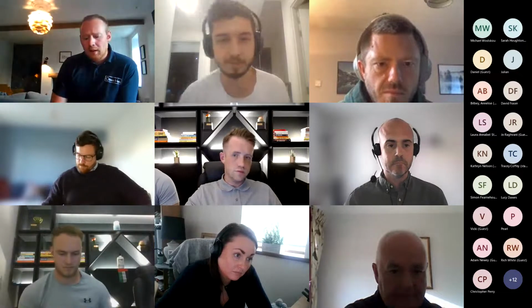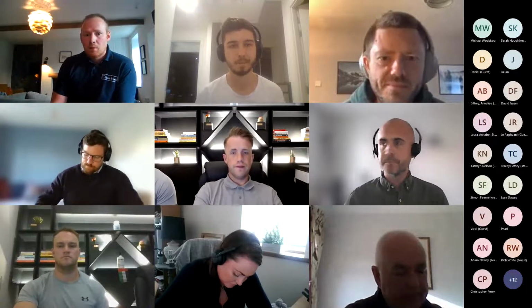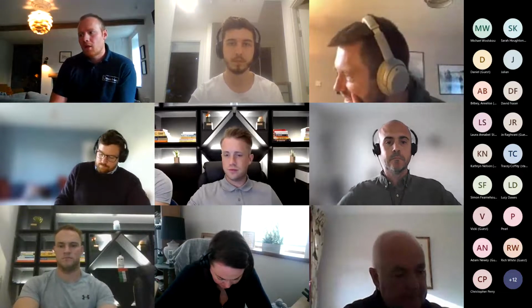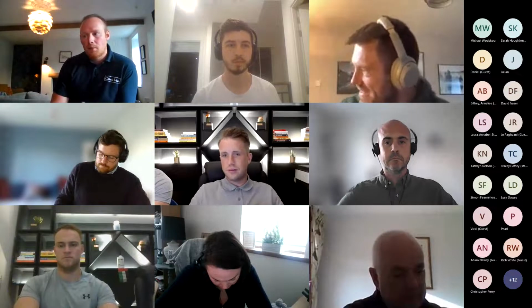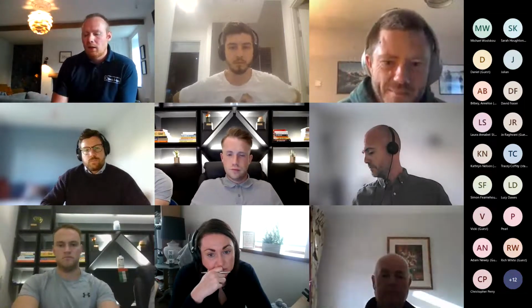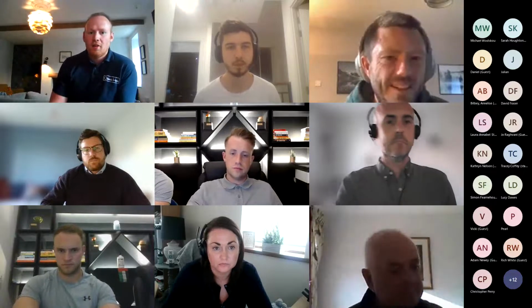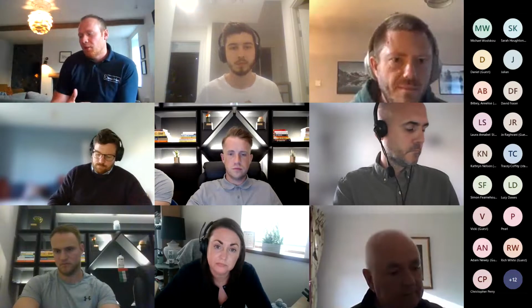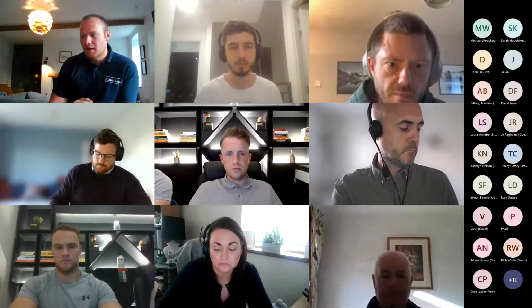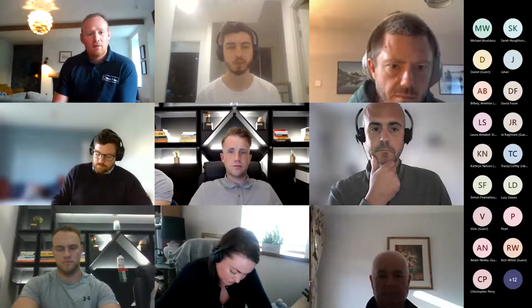Yeah, so basically if people are keen, we'll take a deposit. Our payment structure is basically we take a third up front as a deposit, and then once we start the build, we take another third, and then once we deliver, it's the final amount. So it's totally up to the client, really. I mean, like Calum said before, sometimes planning can take some time. So people have to put their name down and order the hut just to get the process moving. One thing I would say to people is, with a shepherd's hut, if it all didn't work out, you could just sell the hut. I mean, they're not going down in value. So I've sold a couple to some people, and it's given them that advice that it's not the be all and end all. You buy this hut and you can't get planning for whatever reason, it's not like you can't sell the huts on. Fortunately, they all got planning, but that's one of the good things about them being fully movable.